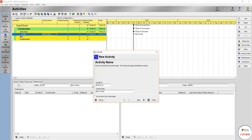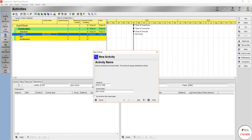You are going - or 100 to give you more space, or 1000 even to write for the excavation works or let's say the civil works. And then your concrete works, you can name it as much as you can. Or you can always use the Uniformat and the Masterformat, or use the company codes if you are working in enterprise.